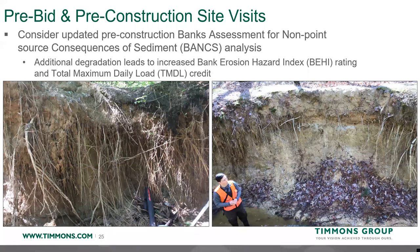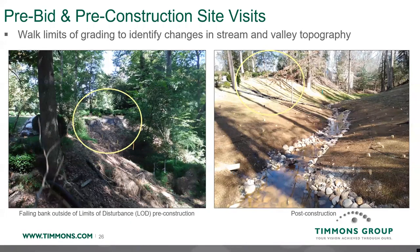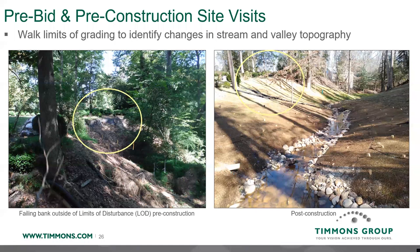Along those same lines, when projects get stretched out two, three, or four years, it's important to walk your limits of grading and limits of disturbance before construction — preferably before your pre-bid meeting — to identify areas that differ from your current design. In one instance, there was a large failing bank with geotextile fabric exposed that was outside our original limits of grading. Catching this during the pre-bid allowed us to talk with the contractor and then work with the locality to get those grading changes implemented, so we don't tie back into a slope that's not stable.